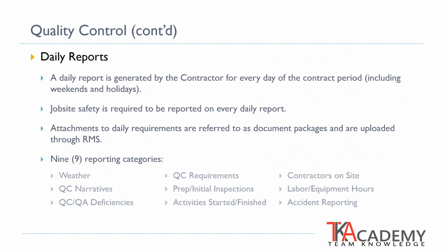Daily reports are required to be generated by the construction contractor for every day of the contract period. This includes weekends and holidays. The daily reports are used by the government to track construction activity for every day during the construction period. Safety is required to be reported in every daily report. Attachments to daily reports are referred to as a document package and are uploaded to this feature through RMS.